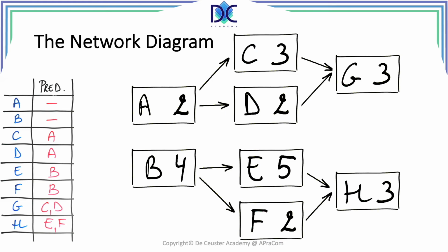You have noticed the hanging activities at the beginning, A and B, and at the end, G and H. This was something that did not happen when you created a diagram using the arrow diagramming method, since event nodes were used. An event node is, for example, the moment when an activity starts or ends. In the AOA diagramming methods, both activities A and B would initiate from a unique start node, typically called 0.